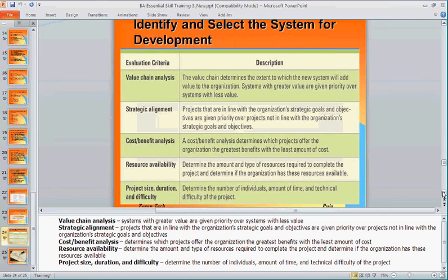All right? So what are you going to do? You will literally, how I have the description here, you will have the evaluation criteria right here. And then you will have RUP, agile, scrum, extreme programming, whichever methodologies that you are evaluating. And then you will evaluate them. Okay? You may give weightage. Have you seen weighted things?